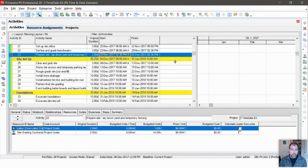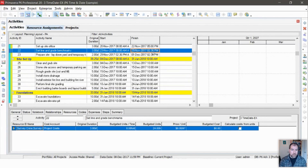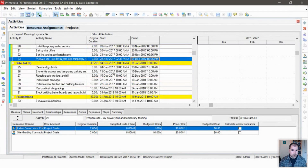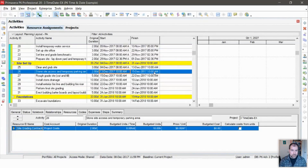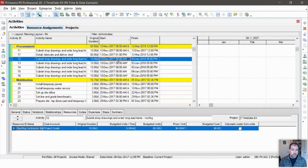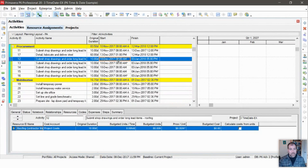And it will ripple through a project. Because of the finish-to-start relationships, all this stuff will ripple through. You can see it's happening here — one finishes and the next one started at that time, forcing the next one to finish at the same time. Even here we have 10 a.m. to 10 a.m. — we don't want that. We want activities to start at 8 and finish at 5, or whatever time. If you have a 10-hour day, it's 8 to 6; a 12-hour day, it's 8 to 8.